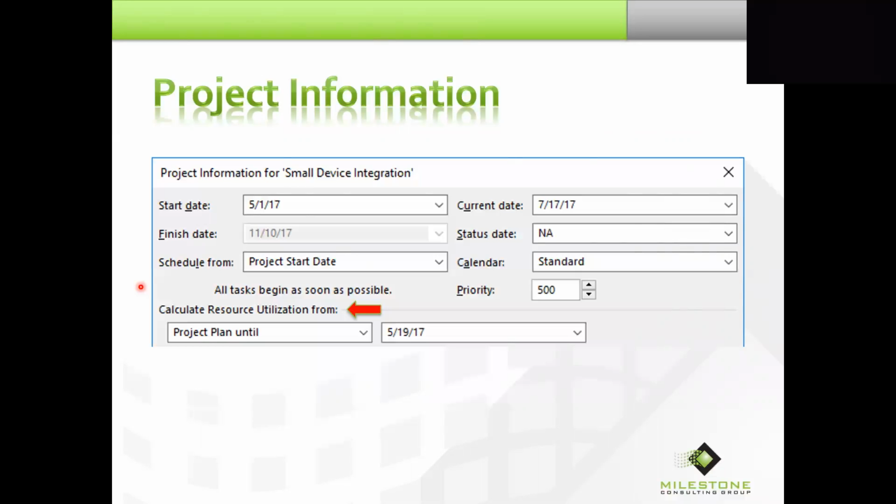In the pure Agile environment, yes, ideal world, developers, team members are allocated 100% to the project. In my experience working with my clients, that rarely happens. Team members are allocated 75%, 60%, sometimes 50%. And so this way, we're getting a good allocation picture so we can tell leadership this is a good picture. You know which resources are consumed and which ones aren't. And I certainly took a baseline before I started the project.